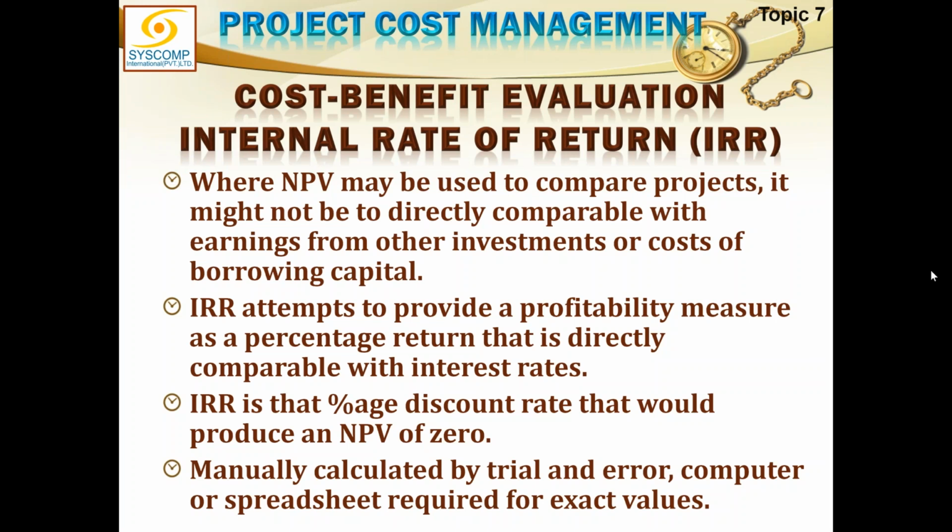Right? Yes, it will change the numbers. So I am trying to find the break-even point. So let us vary the percentage. Let's make one calculation on 10%, one on 9%, one on 8%, 7%, 6%, 4%. And I am trying to find where it becomes exactly equal to zero. Where my NPV, total NPV of the project becomes exactly equal to zero.